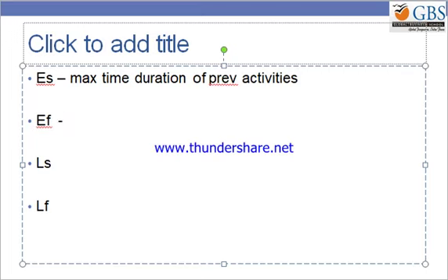It is ES plus normal time, the time duration which is given as normal time.